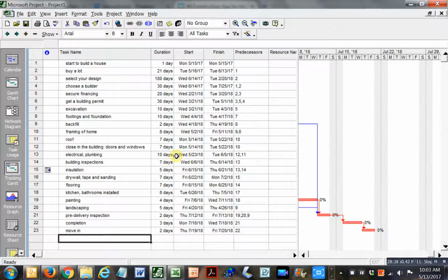So if you tell a client it's going to take a year to do this, in fact, a little bit more than a year, it's going to take 14 or 15 months to do it, and they don't believe you, if you're a builder, you can show them the schedule and say, okay, what can we do faster? And then you can work together in a collegial way. If you tell somebody that by the time they've done all of this, it's going to take 15 months to deliver the building, and you deliver it in 14 months, you are a hero.